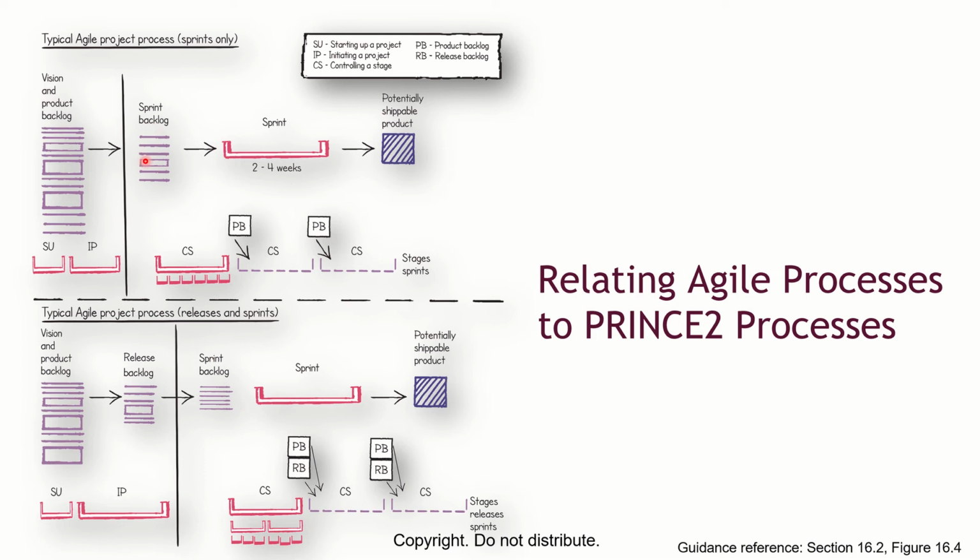So what are the activities you are going to do? How deep will you dig? All those things are the activities you put in a sprint backlog. The potentially shippable product here is going to be the foundation, complete foundation for the 20-story building. The sprint backlog is the list of items of what you want to achieve. And that is related to a process which is called controlling a stage. Controlling a stage.